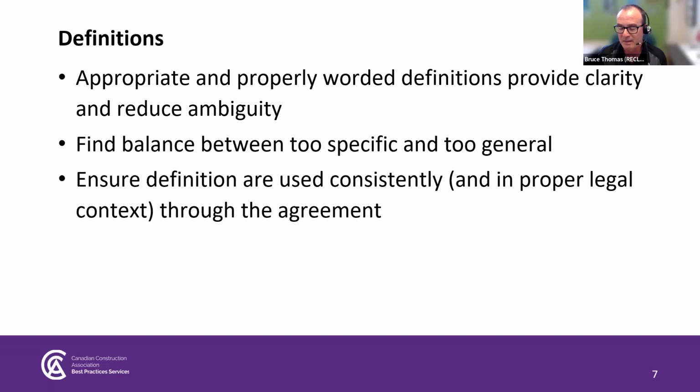Lately, we've seen trades in particular looking to add definitions of tariffs. In law, duties and tariffs are interchangeable, and typically duties and tariffs are acts of government. So if you look at a force majeure clause and see act of government included, I think your lawyer will probably tell you that you can rely on that pointing towards tariffs and duties, but it never hurts to add the word tariff and or duties into the documents to ensure those are recognized potential force majeure issues.